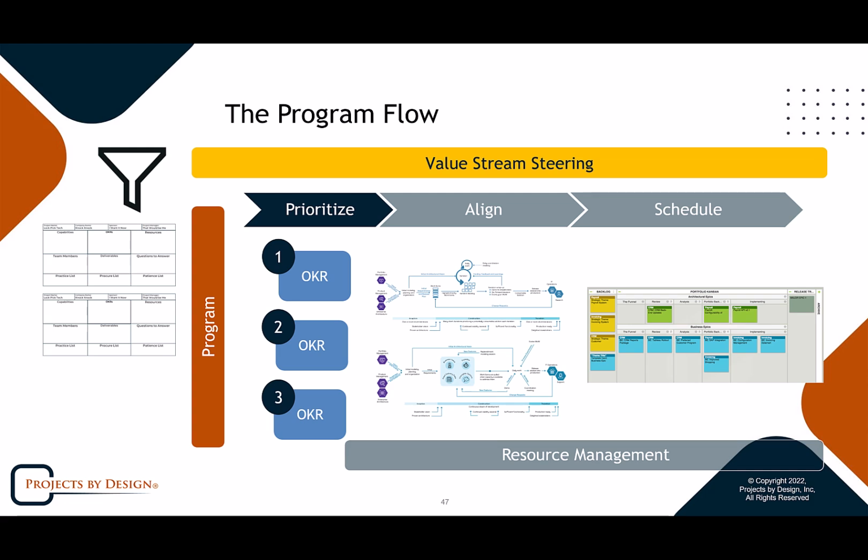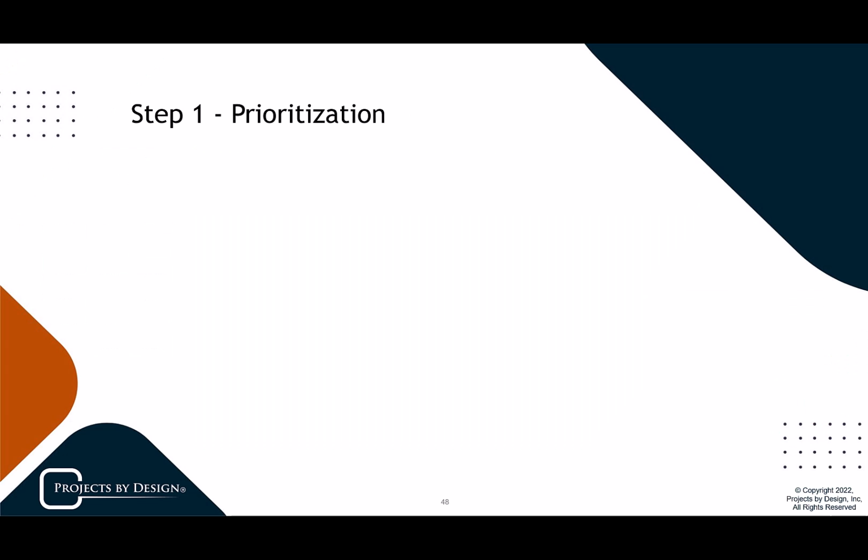Okay. The idea being that we establish a clear set of priorities of what it is that we're going to deliver based upon that demand. And then we're going to organize that work into specific deliverables that we're going to call MVPs or MBIs, align those to the patterns, and then later on we're going to talk about actually building this schedule in a program Kanban. Okay, an information radiator or visual representation of the work and when it's going to be delivered. Okay. So, step one, prioritization.